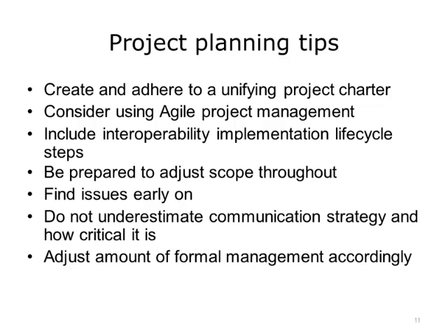Consider the Agile method for implementation, which allows you to quickly prototype solutions. End users benefit from prototyping so that they see how interoperability will work. Also, since the project has hidden complexities, breaking it into smaller, prioritized projects makes sense.